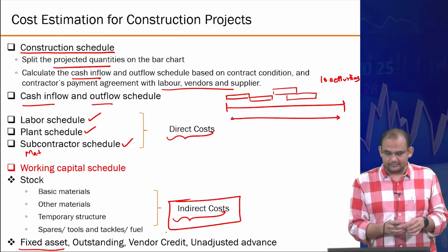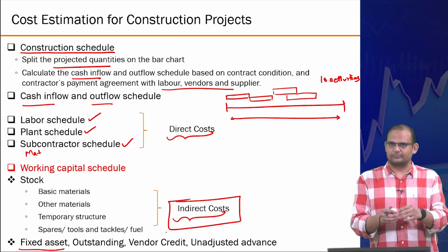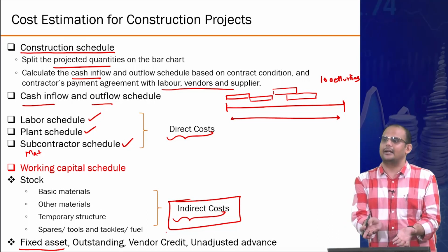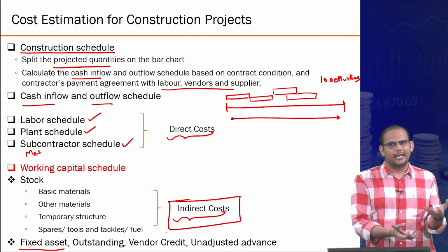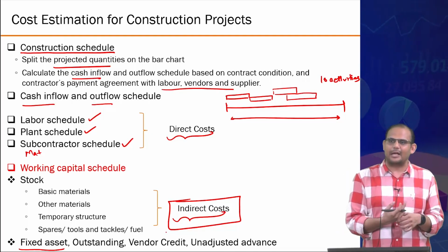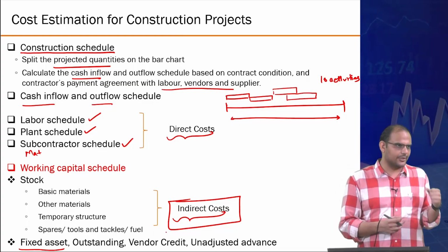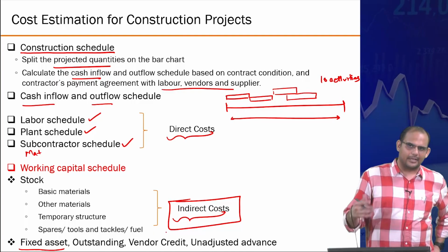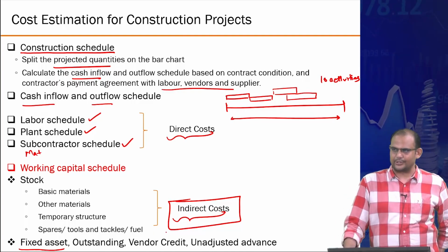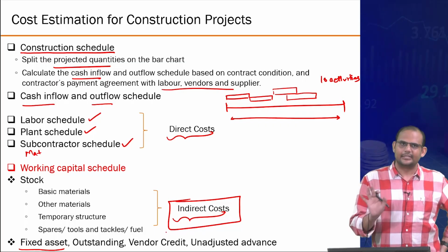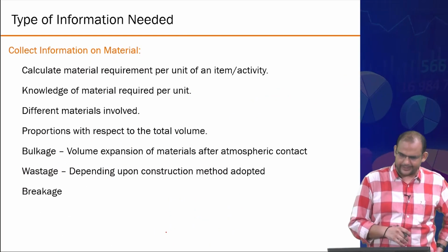But it could be that you start initially and you do not map the activities one-on-one and you end up with 90% indirect cost and 10% direct cost. Then you will not know what is happening in direct cost and you will not be able to have better control over the cost. So it also depends upon how granular you really want to go, depending upon what kind of activities you are doing. Okay? Basic story set, direct and indirect cost we are dealing with.